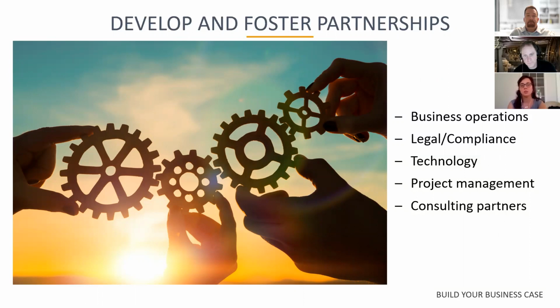Whatever solution is chosen, it will most likely need to be supported by IT. So having them on your team is crucial. When IT is not engaged, there's no visibility into the IT strategy. And without that, you're going to have a hard time knowing what's going on. And it can lead to point solutions. These are solutions that only solve one problem, the technological equivalent of a Band-Aid.